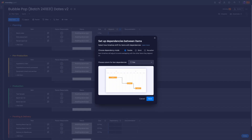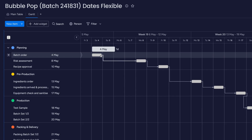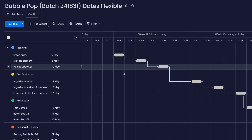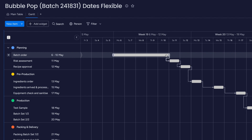You can set dependencies in the column for the tasks before it and the dates that they are planned for completion. What the dependency does with the date depends on the mode you have set. With Flexible mode, the parent item can be moved at any time before the dependency child date is set, and it won't affect the child item. If the parent item is moved past the date of the child item, the date for that child will move to ensure that it is after it, so that it can't be set to a date or time before its parent dependency.